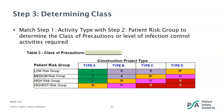Step three is determining the class of precautions needed for the project. In this step, we put together the information on the construction project type — found at the top — and then combine that with the risk group determined down the left-hand side. This determination will guide us on the mitigation strategies that need to be taken on the project from start to finish. The class of precautions goes from class one to class five. Class five was added with the new tool updates to add more precise precautions when looking at medium to high-risk projects.